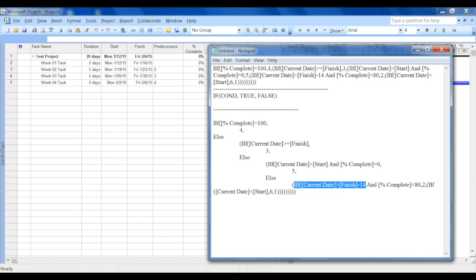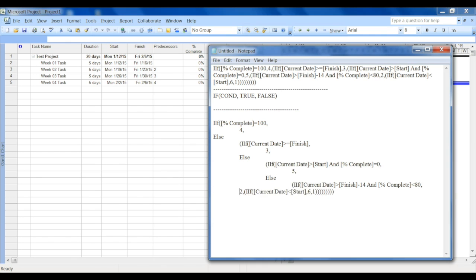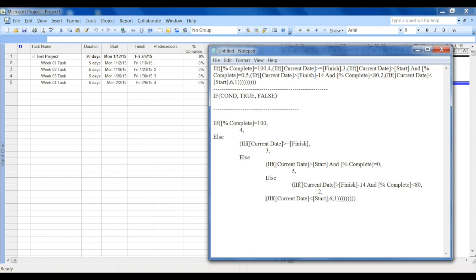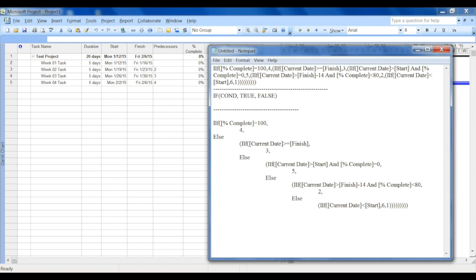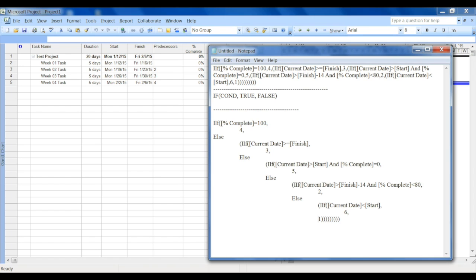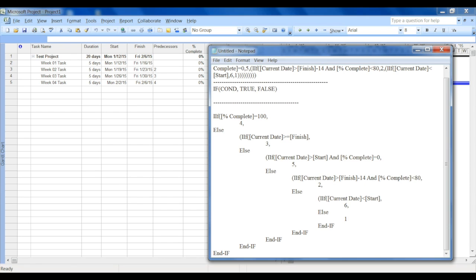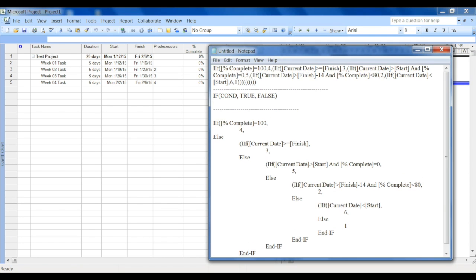In that else there is another nested IF condition. So again, if the date is greater than finish minus 14, which means it's within two weeks, and the percentage complete is less than 80%, then display two. Else you do another check which is: if the current date is less than the start, then display six, else display one. So that's the end of all IF conditions, five nested IFs.